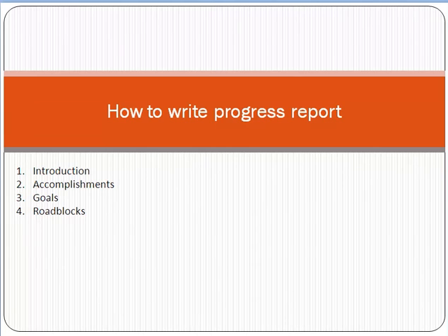Also friend, if there is any issue, for example in the month of July, you are expecting that in the next month the resources from the customer side will not be available, so some tasks will not be completed because of the customer's unavailability next month. It is not necessary that it be only from the customer side. If there is any issue, problem or roadblock from your own side, you should mention it as well.